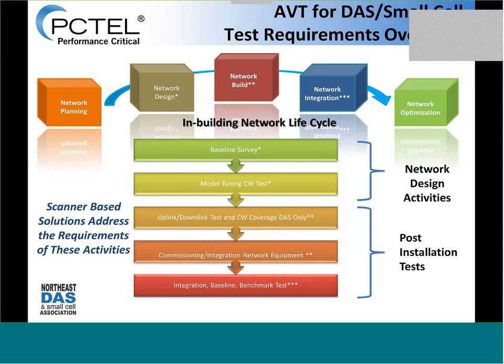That's usually referred to as commissioning and integration, and it's focused on the network equipment after it's installed. And then lastly, of course, now you're ready to go live with the network. So you're ready to do some full integration tests. That word's used again oftentimes. You want to do a baseline. How is this network performing? So compare that to what you had before. You compare it to your design to see if you really achieved all your design goals. And then you actually have a permanent snapshot of where you were.